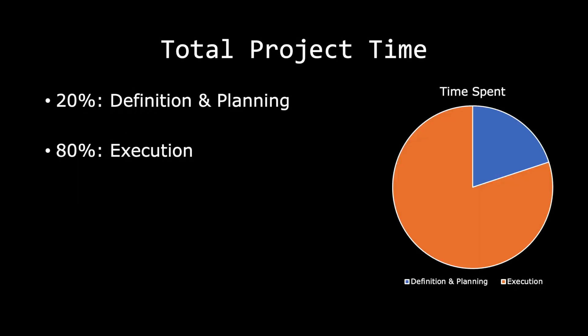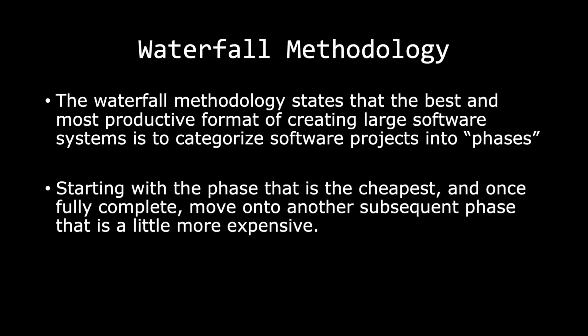There is no set rule on how much time should be spent on which phase of the project lifecycle, however most people generally agree that 20% of your total project time should be dedicated to the definition and planning phase, and the other 80% should be dedicated to the execution phase, which includes creating and testing your product. One type of project management methodology is the waterfall methodology, which was written and theorized in the 1970s and popularized in the 1980s and 1990s. The waterfall methodology states that the best and most productive format for creating large software systems is to categorize software projects into phases, starting with the phase that is cheapest to produce, and once fully complete, move on to another subsequent phase that is a little more expensive.